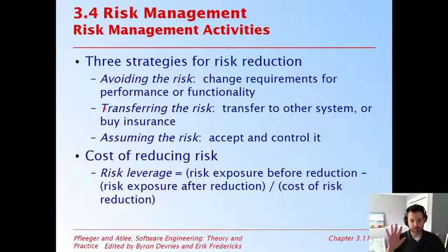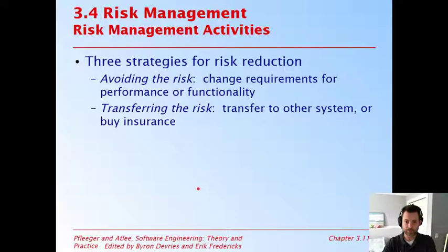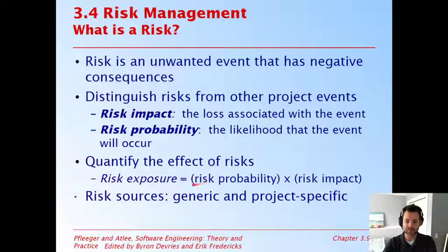But the point is that whatever decision you make, and again, you the manager, how do you back that up later on? Each of these is a viable answer, and how you handle it is viable, honestly. But usually it's good to have some data to back up your decision. And this is where trying to quantify what risk is actually quite helpful. So risk exposure, if we go back a slide here, two slides, is probability times the impact, right? So these are ethereal numbers which are specific to your problem. So what is the exposure?